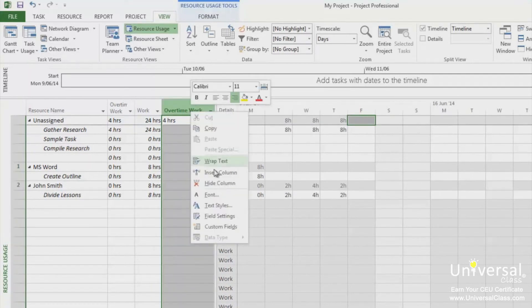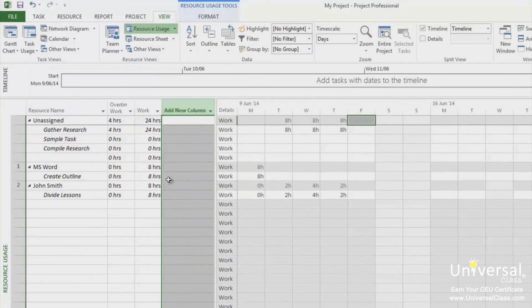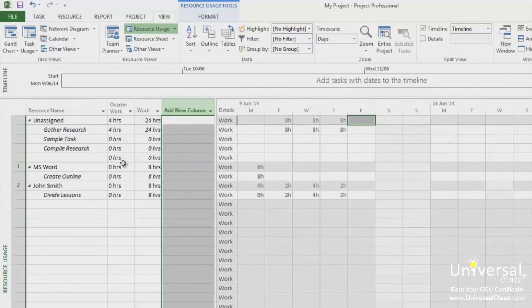If you don't want the column, right-click on it and go Hide Column. Next, click in the column for the assignment for the resource and then click the up or down arrows to specify the overtime hours worked.